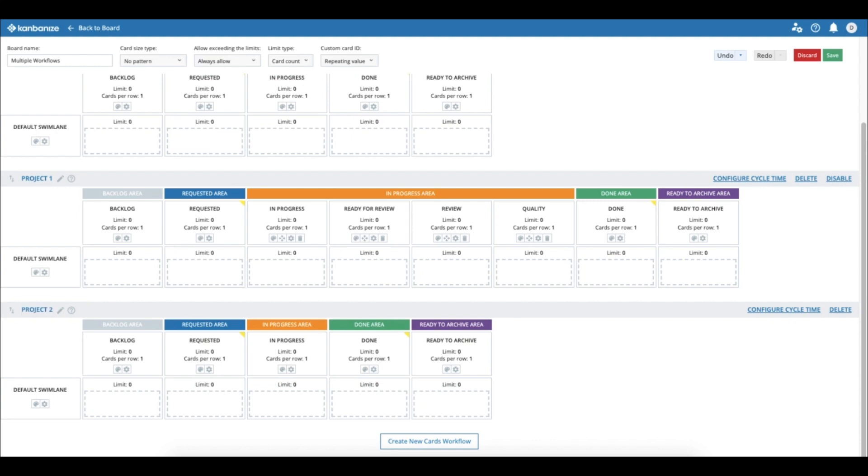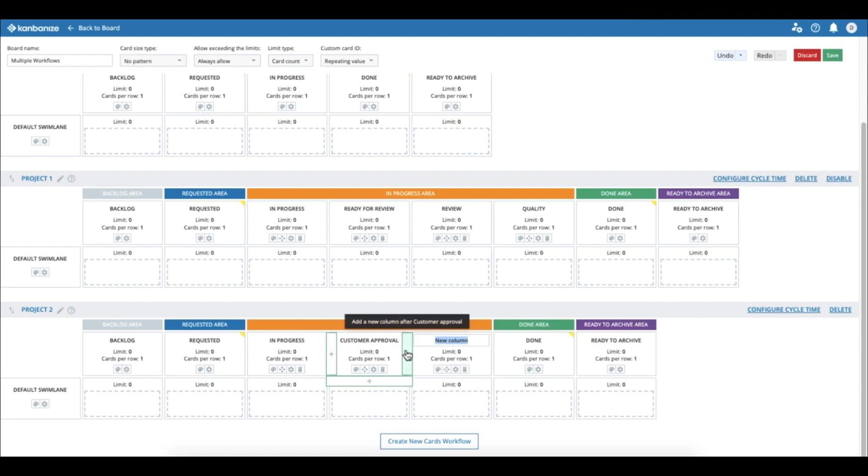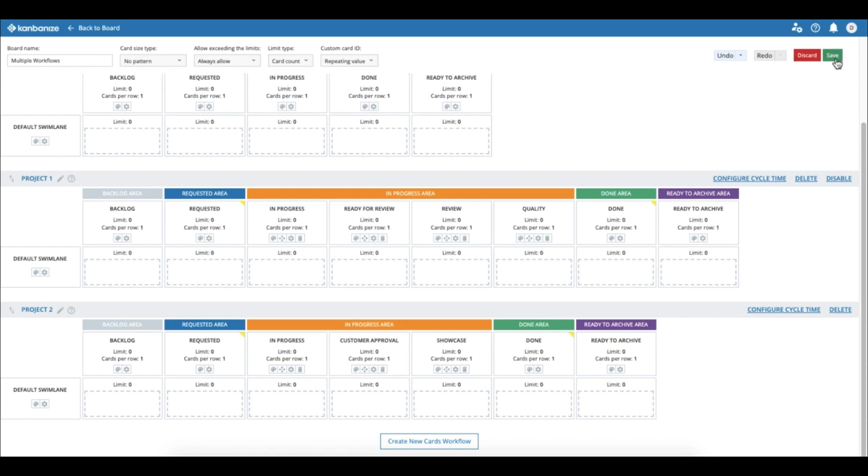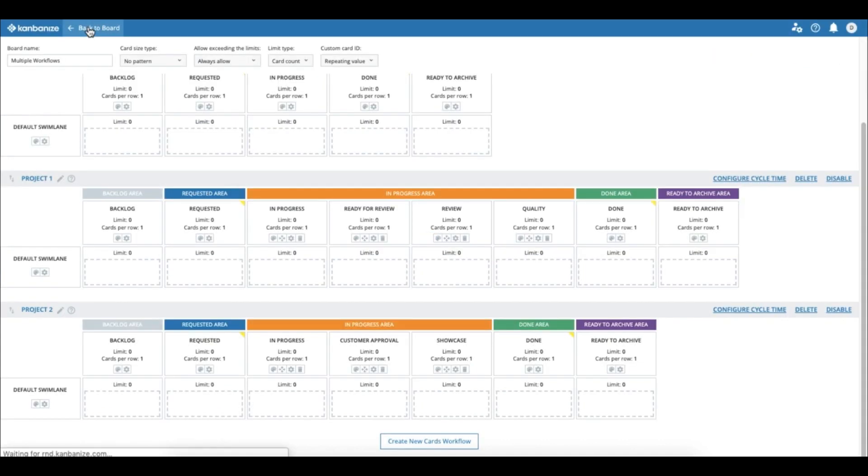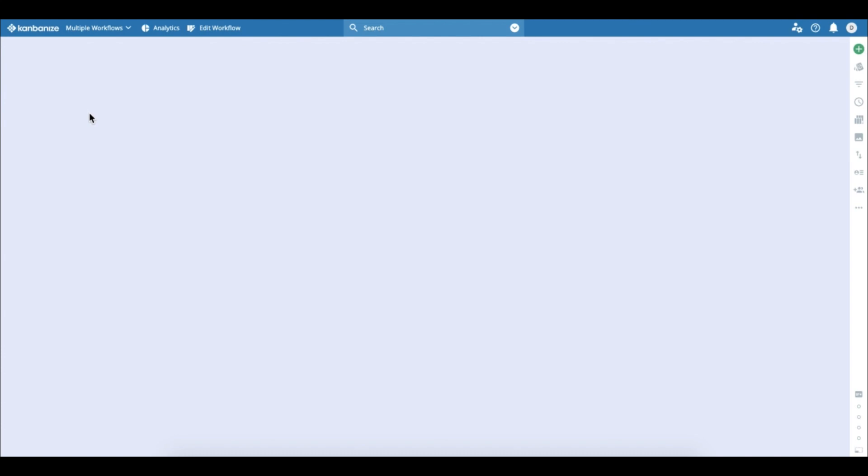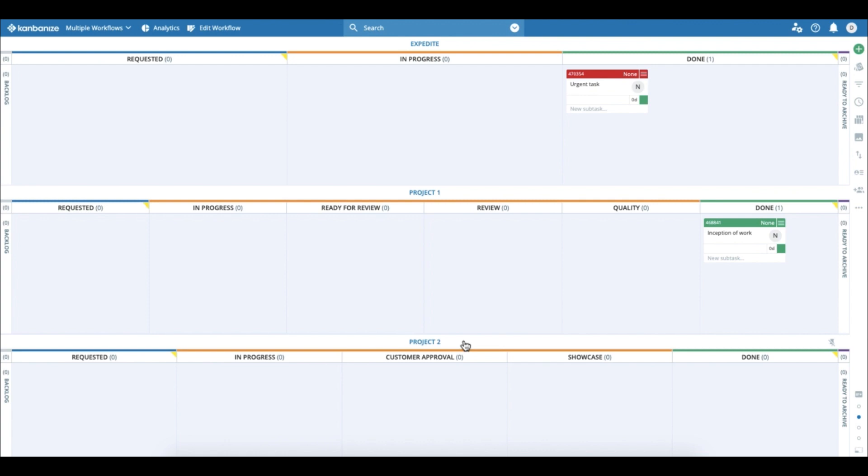And then this project one and project two, they need to have different workflows because the second project requires customer review and approval before work can complete until the actual showcase column. So if we go back to the board, we see that we have now the fully implemented structure with an expedite and then project one and project two lanes, or more precisely, workflows.